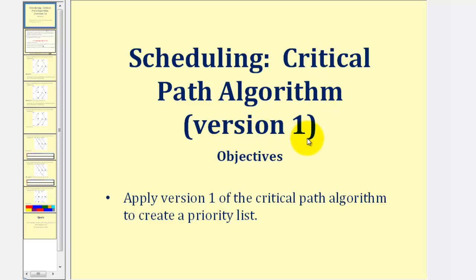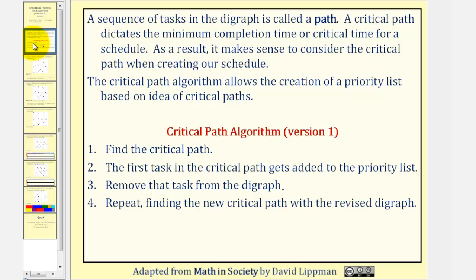Welcome to the first lesson on version one of the Critical Path Algorithm. In this lesson, we'll apply version one of the Critical Path Algorithm to create a priority list. A sequence of tasks in the digraph is called a path. A critical path dictates the minimum completion time, or critical time, for a schedule. As a result, it makes sense to consider the critical path when creating our schedule. The Critical Path Algorithm allows the creation of a priority list based upon the idea of critical paths.